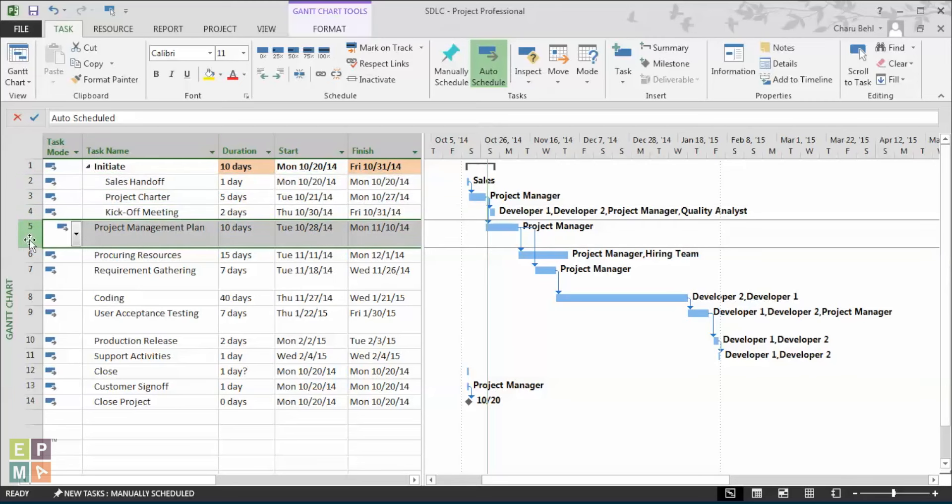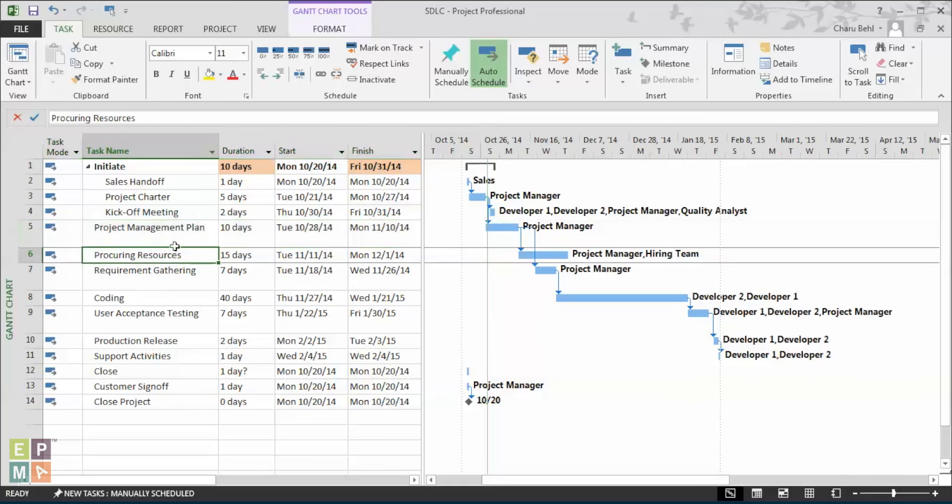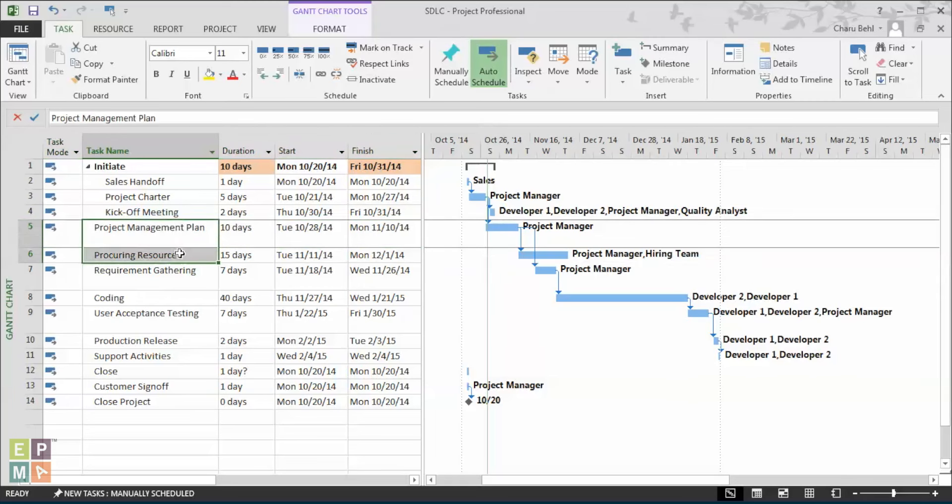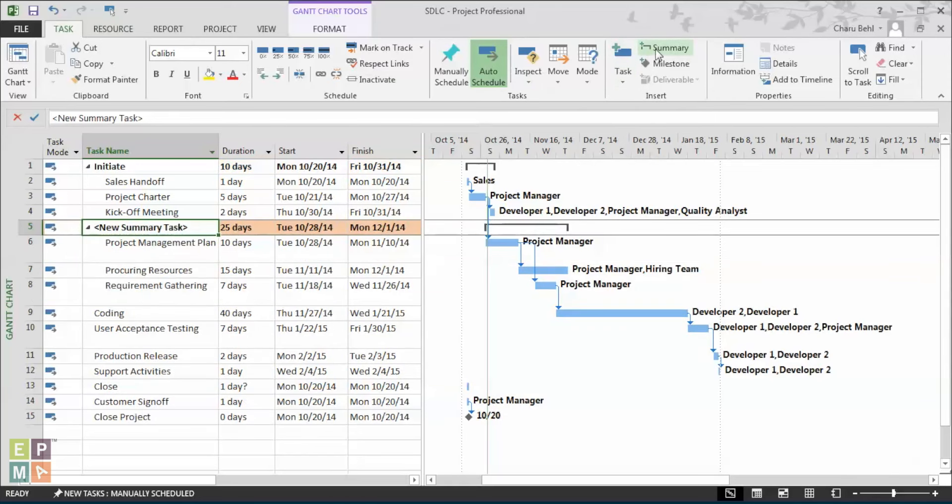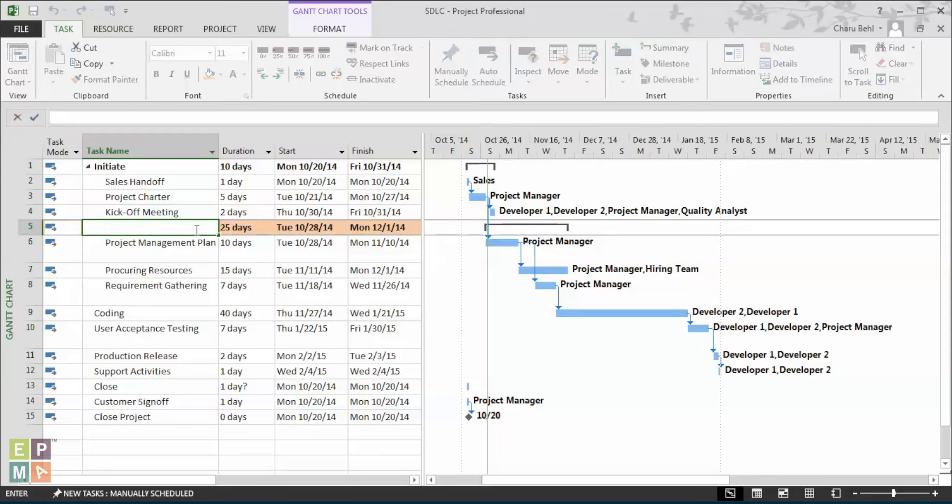A quick tip and the second way to insert a summary task is to select all the task names that need to be a part of the summary task and then under the task ribbon and within the insert section, I will go ahead and click on the summary button and you see that how the summary task is inserted. Give it a name like so.